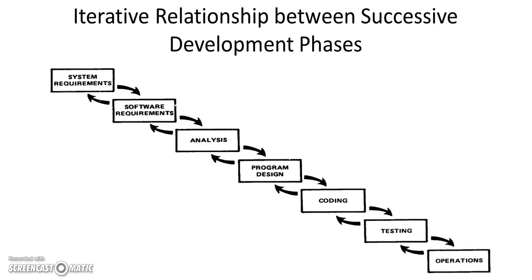So what he says is, you should always be able to revisit a previous stage. It's not good enough once you get to analysis to say, all right, well, once we've signed off analysis, we never need to go back and do further analysis. If at a later stage in the process we identify further needs or further requirements, we may need to revisit analysis, reincorporate elements and new elements into the design, recode, retest, and rerun. So, not simply going forward, we have to be able to go back as well.